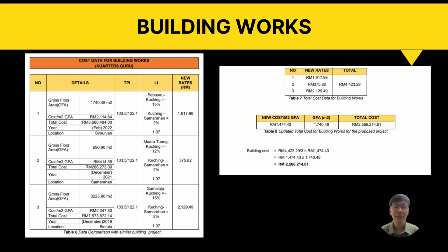RM2,566,214.61, which is exclusive of services, preliminaries, and external works elements. This cost needs to be updated to the current price level as there are always changes in market condition and price level, which affect the labor market and materials in the future.